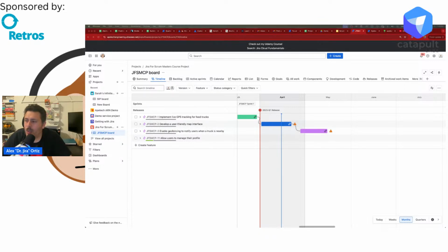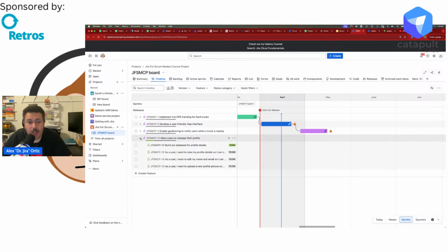But we're going to take these items here and break them down, and we're breaking them down right now, right? But you need to break them down, because guess what? Epics don't go into your backlog at all. And so everything needs to be either a story, a task, or a bug. All right.